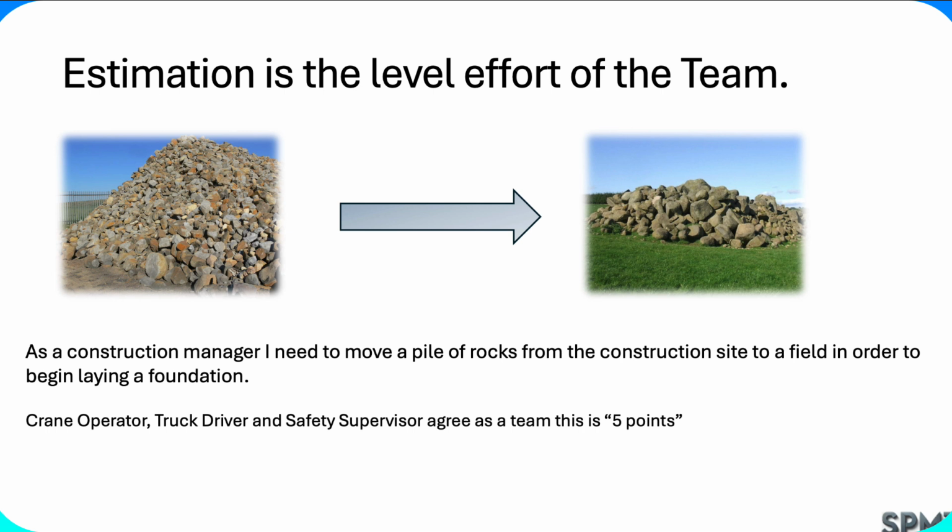You want the team to do the estimation and not just a single engineer. So in this case, the crane operator has to give their input, the truck driver, the safety supervisor, maybe people that have to shovel rocks at the end. Whoever is on your particular scrum team or pod, they need to look and discuss how much effort this is, and they decide whether it's 5 points,